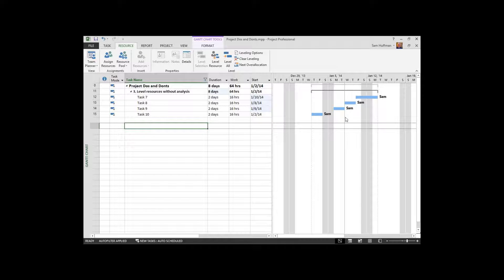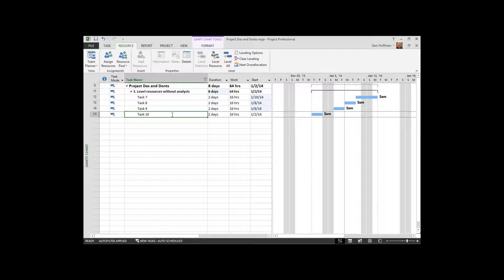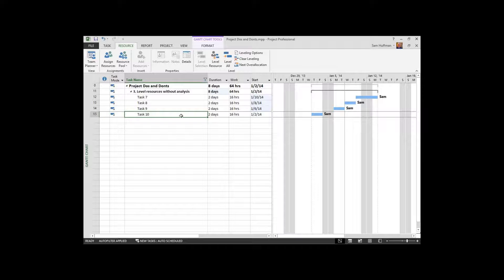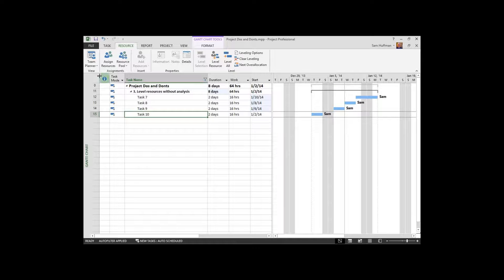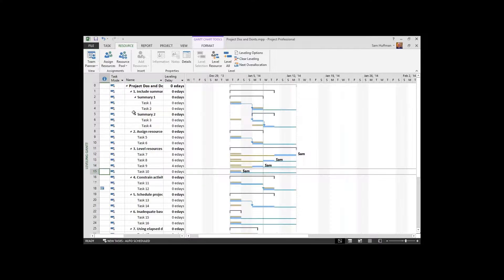Now this is a Gantt chart. It's the most popular view in MS Project. But I will encourage you to not use it in leveling. I would encourage you to use a different type of Gantt chart in leveling to help you understand things like delay, where it is, which tasks have it. And then I'll also show you one other aspect of this to watch out for. So the chart that I like to use when I'm leveling is called a leveling Gantt.